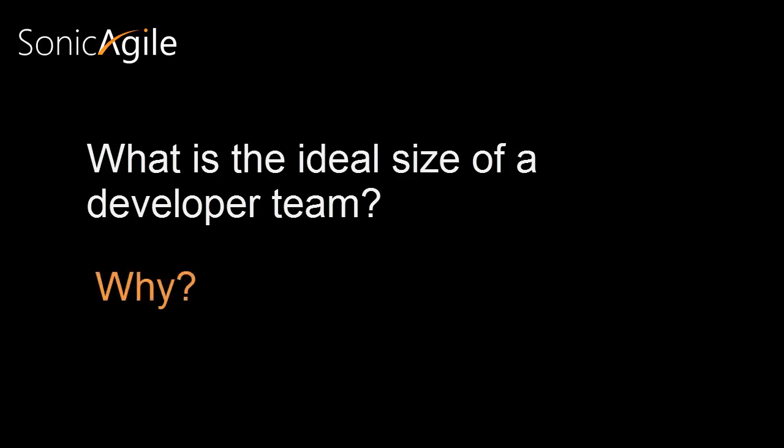But why? I want to know why. Why that number in particular? Well, first of all, there are a lot of Scrum masters that say that they've used Scrum with larger teams and had good results. Of course, there are Scrum Masters that have used Scrum with smaller teams, let's say 3 people, and had good results. But you want to have enough people on your team so that you can have people interacting with each other, but you want to limit the size of the team because otherwise just scheduling, having meetings, starts taking too much time. For example, the daily Scrum should be limited to only 15 minutes. So that's why we limited it to maybe 9 people.